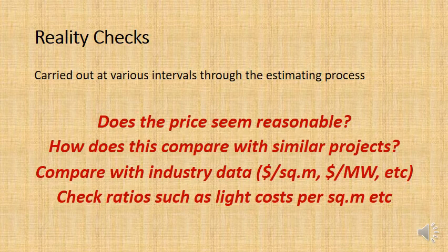Compare it with industry data. Is this actually what it normally costs to build a building, for price per square meter, or a price for every megawatt that the power station makes, and so forth? There's a lot of variation there, but historical data is so valuable when you are estimating, regardless of what method you're using. And also just check certain ratios, such as the light costs per square meter.